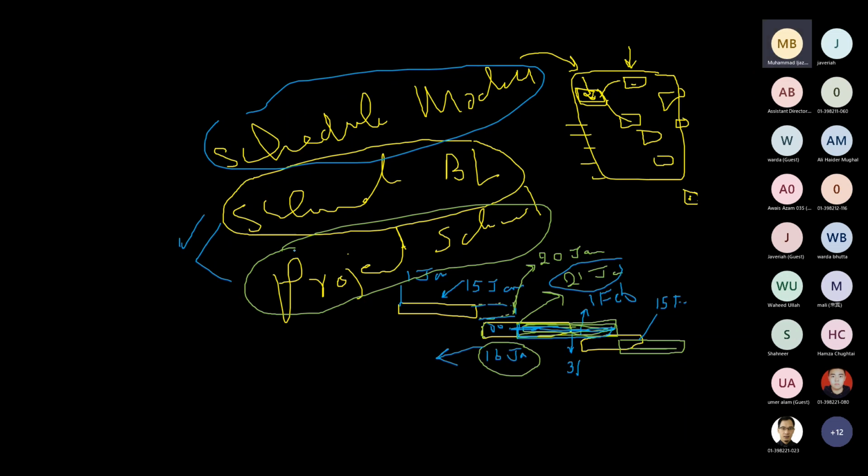So the project schedule is a project document, but the schedule baseline is a part of the project management plan. Since we have to keep rescheduling our activities, or keep determining our budget even during the project, that's why we look into the project schedule rather than the schedule baseline.